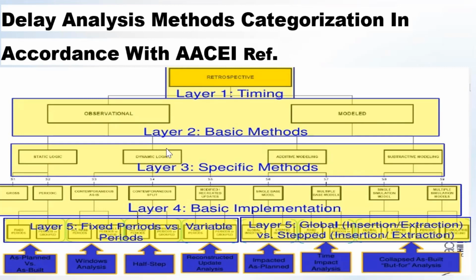So if we are going to say that we are doing retrospective, observational, dynamic, contemporaneous as-is, or modified method, then we'll say, and this can be called also Windows analysis. That's how it goes. So this is the start point.